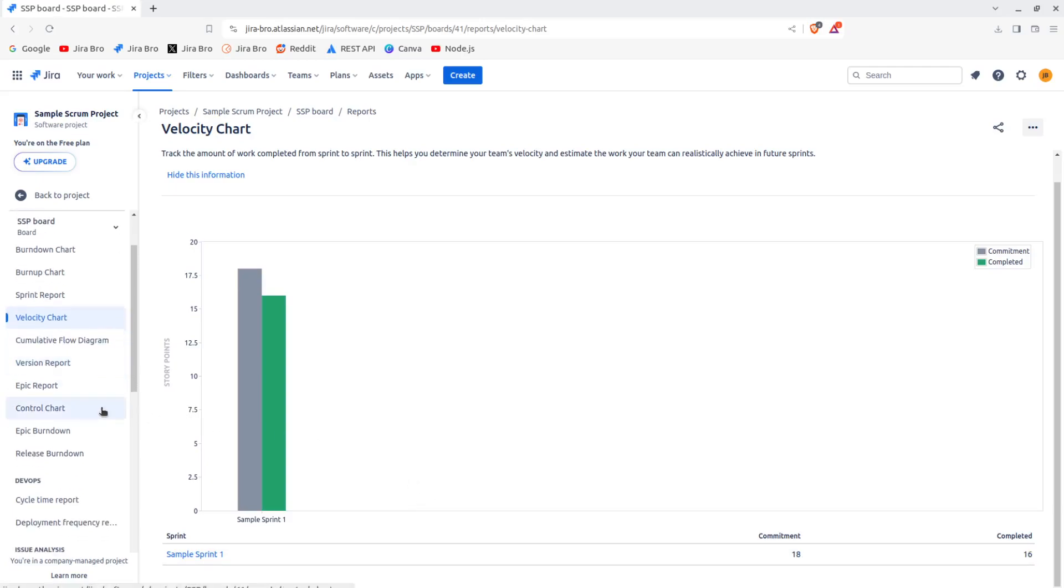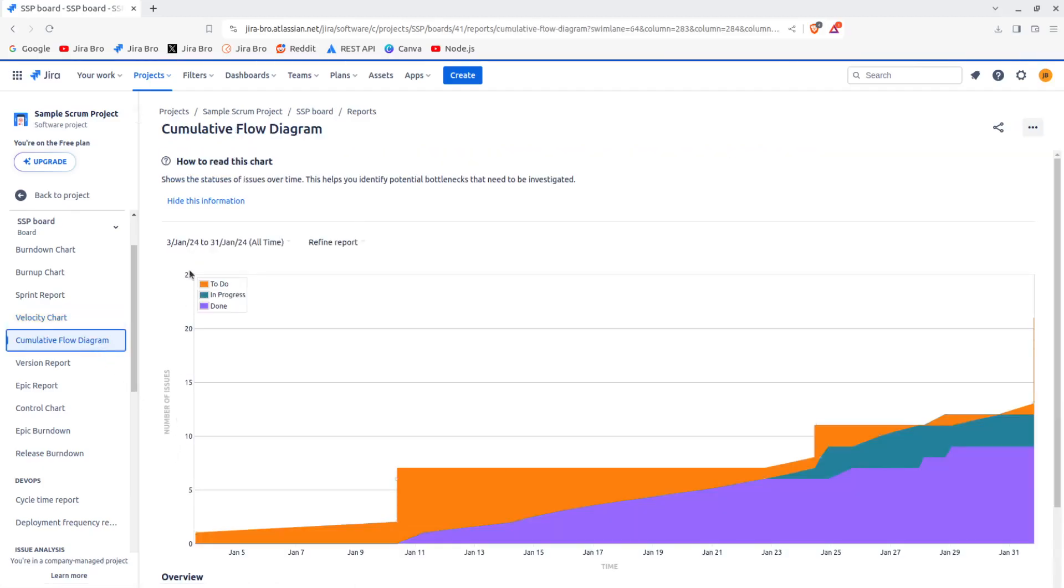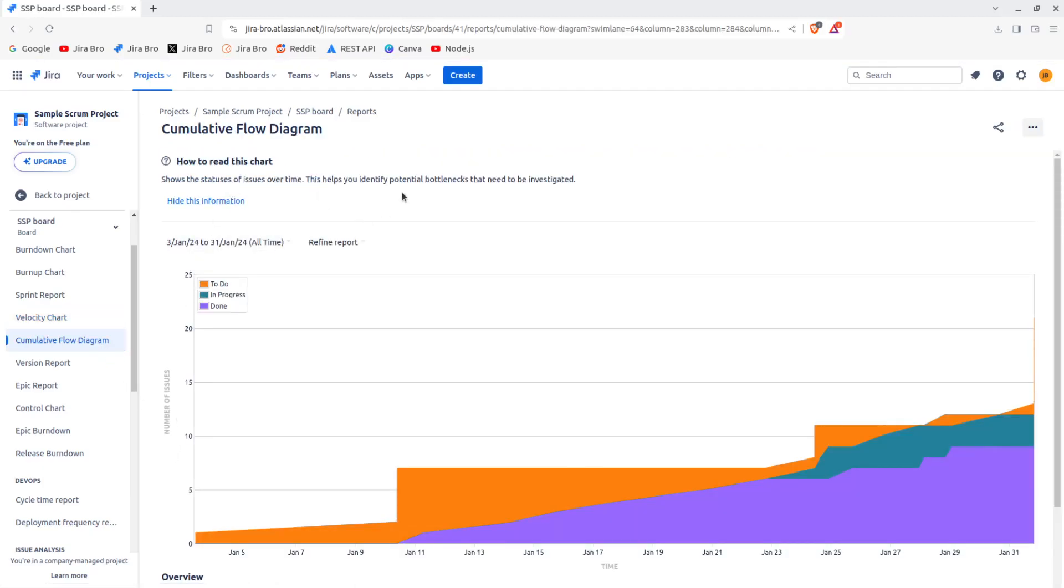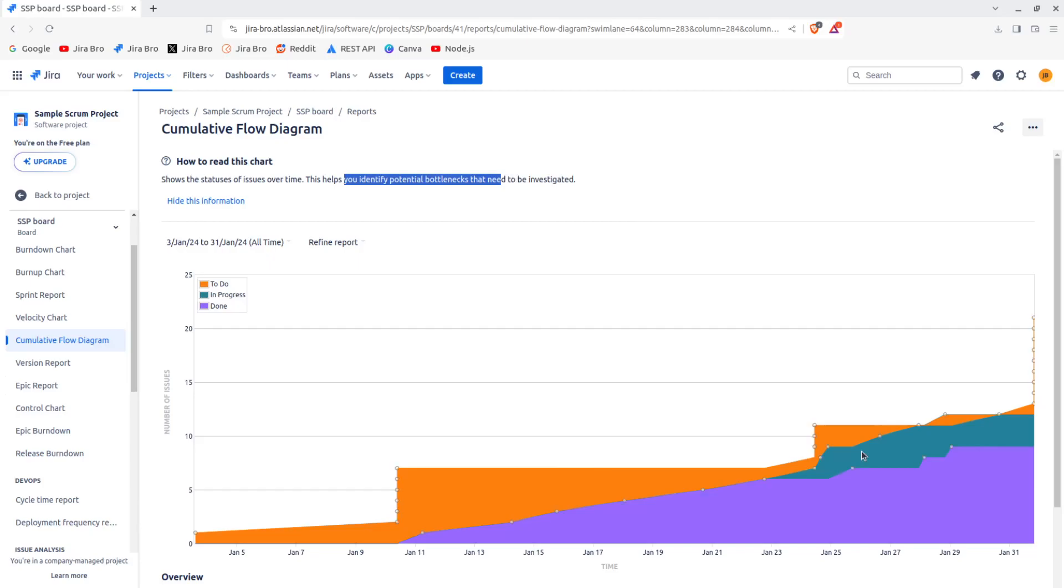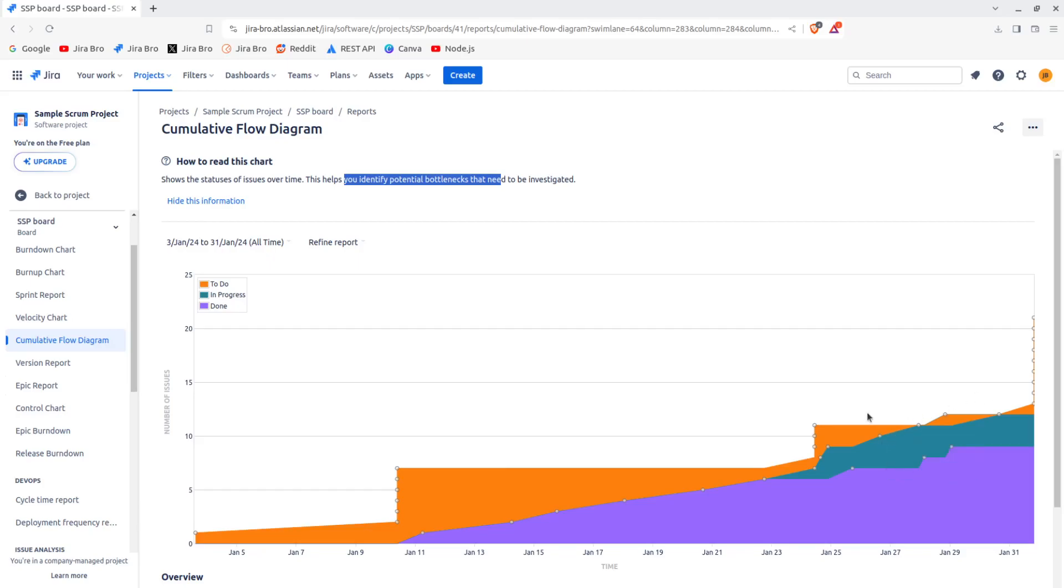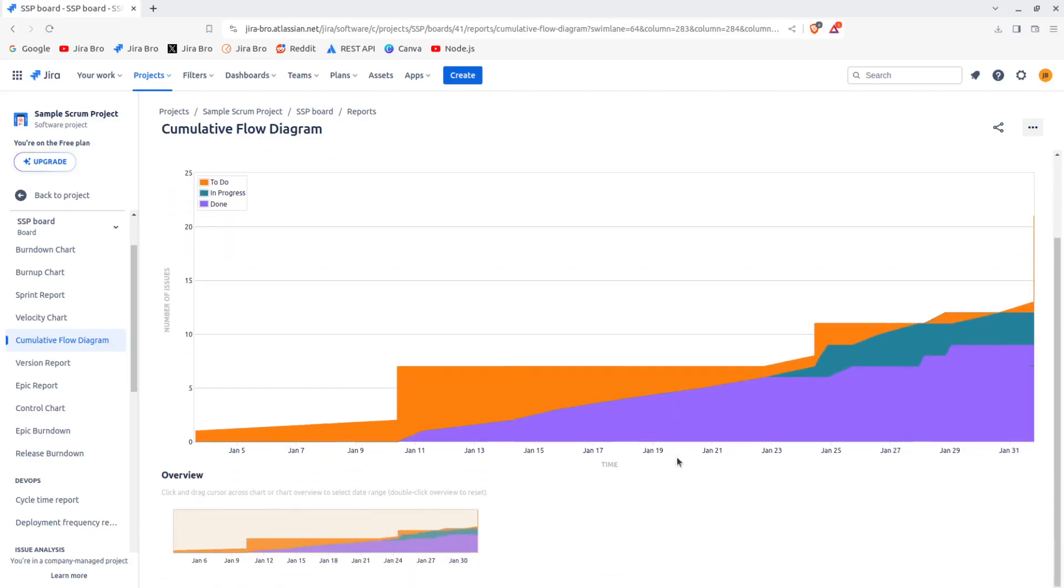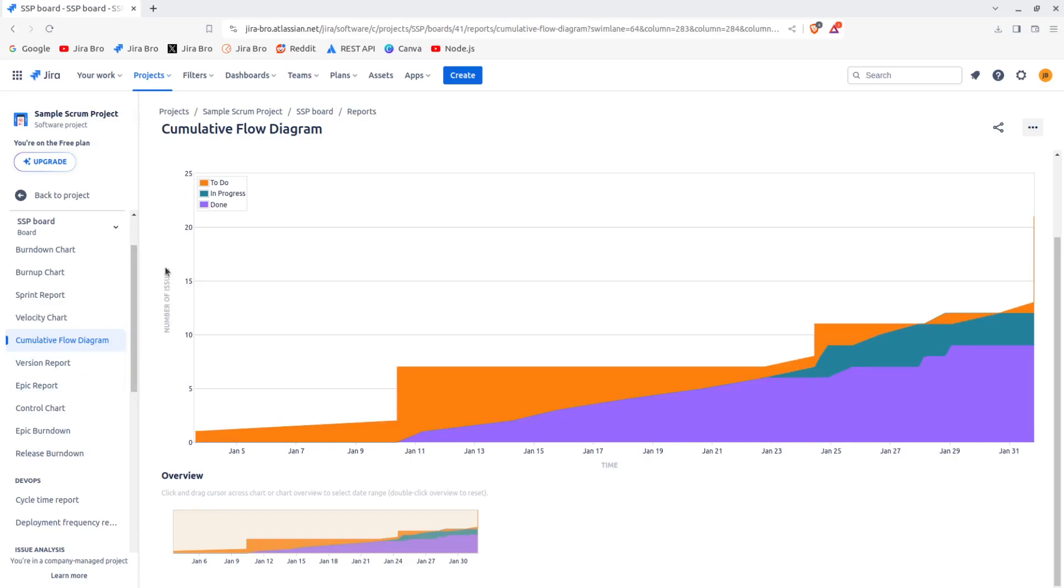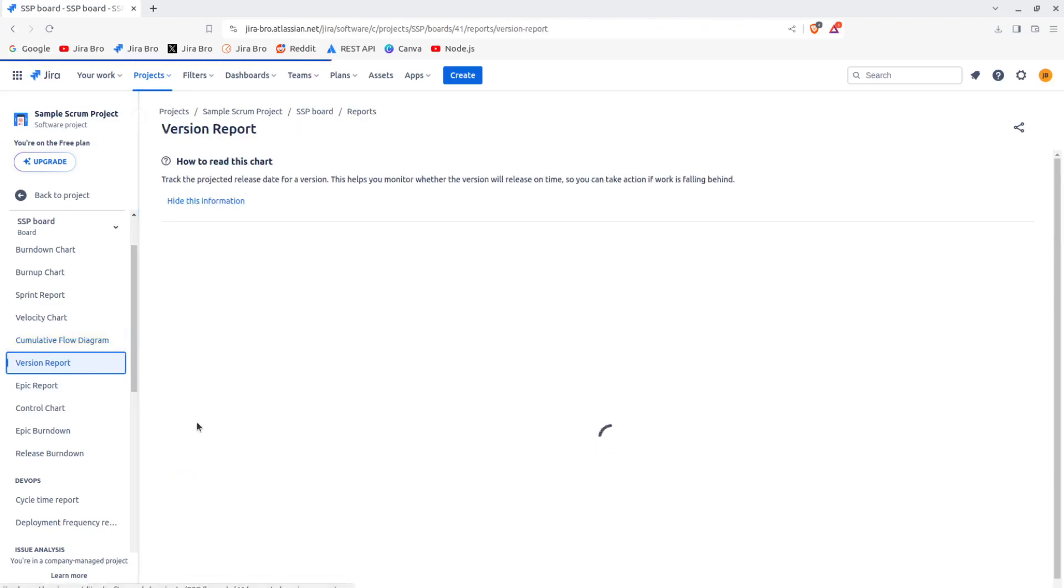Cumulative flow chart shows the statuses of issues over time. So this helps you identify potential bottlenecks that need to be investigated. You have some things that were being going on. This one is done, and this one is in progress. And then you have ones that are in to-do. So that is the cumulative flow chart.